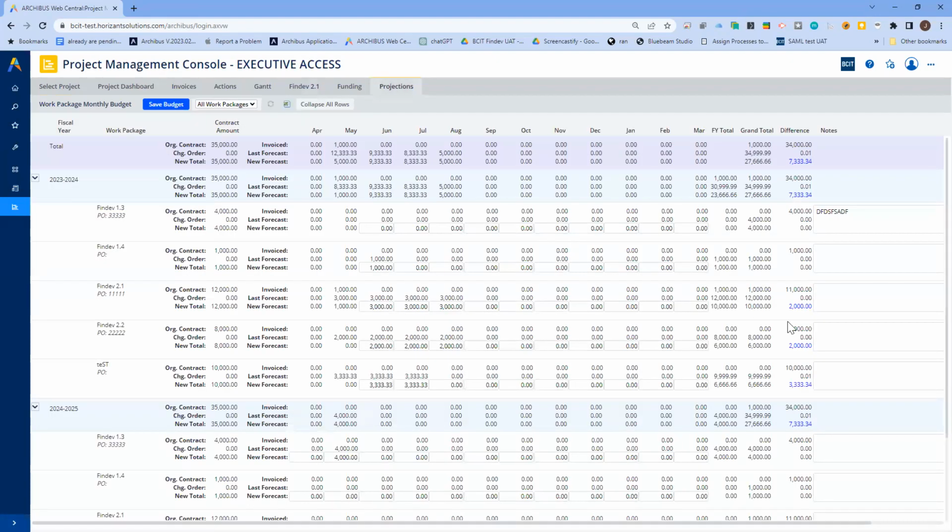And you'll see that that's what's reflected there in those 4 months: May, June, July, August have $3,000 each. And then if you look below that at the new forecast, that's the fields that you play around with and modify. Some of the fields are read-only, some of them you can modify. You can't modify anything in the past. So you'll see there that $1,000 is not editable.